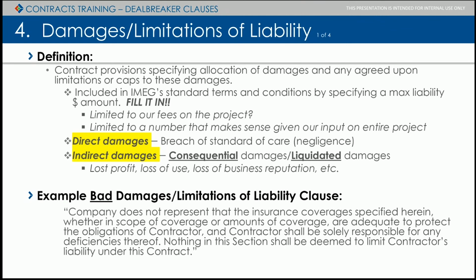The certificate of occupancy is delayed by 10 days because we did that. As a result, there's consequential damages. That's an indirect damage of that breach. That can get pricey. Usually what we see is a waiver by both parties in seeking consequential damages, because both parties understand that those numbers can get real high.